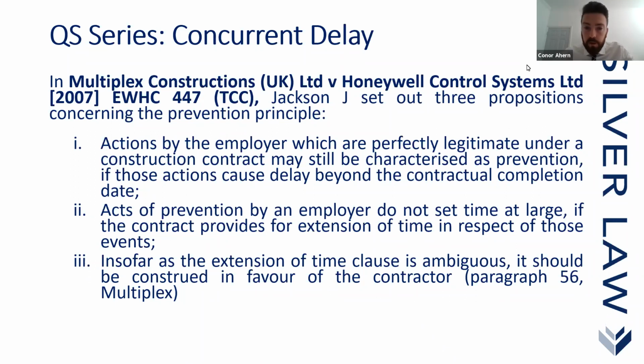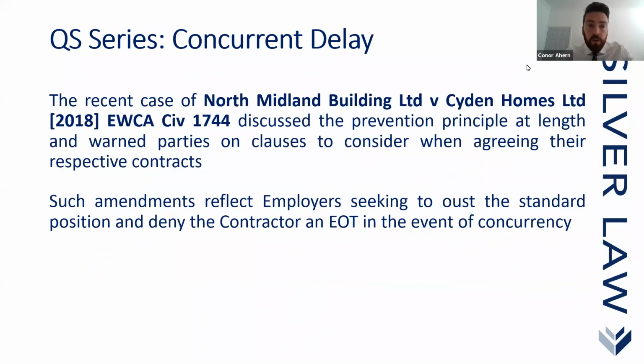It sets us up quite nicely for what happens in the following case of North Midland versus Side and Holmes, which ended up in the Court of Appeal. Now, this is an important case that discussed the prevention principle at length, and warned parties on clauses to consider when agreeing their respective contracts. Such amendments reflect employers seeking to oust the standard position and deny the contractor an extension of time in the event of concurrency.